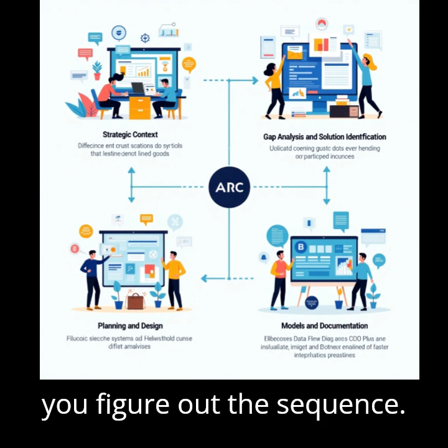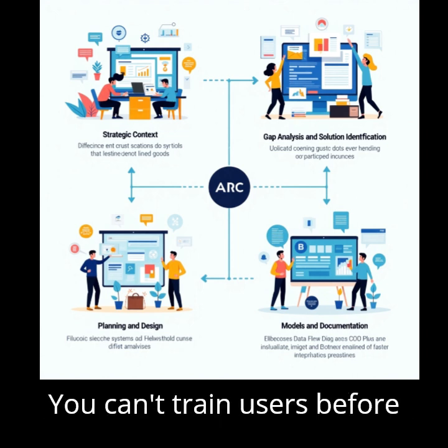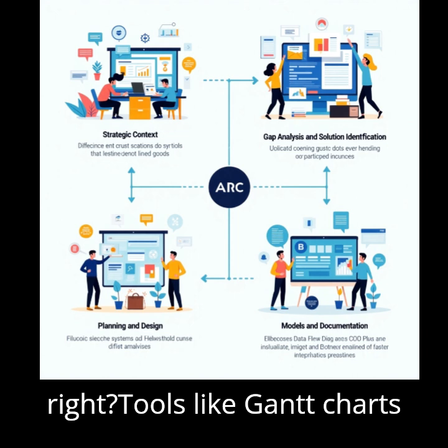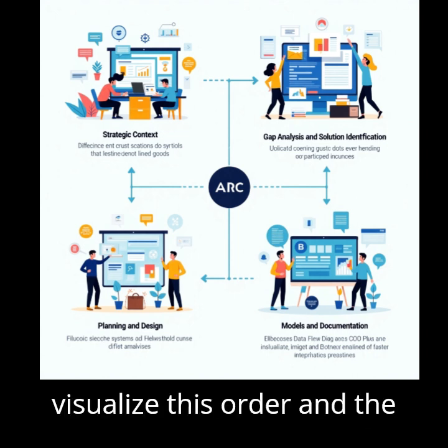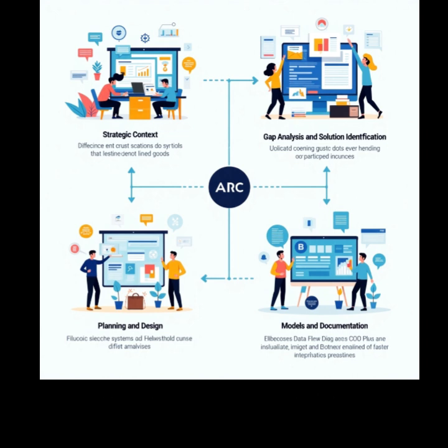Then you figure out the sequence. Which tasks depend on others? You can't train users before the software's installed, right? Tools like Gantt charts or flow charts really help visualize this order and the dependencies. Right, dependencies are key. Definitely.